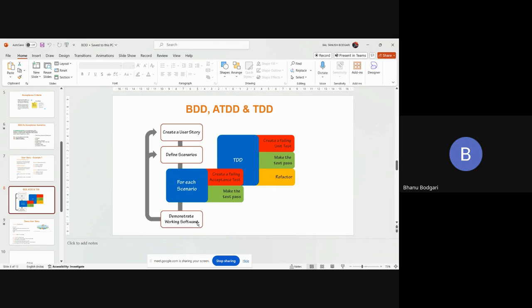And whichever framework you use, particularly I like what we see in the LeSS framework, because LeSS also suggests exactly the same: in all the backlog refinements, make sure your actual customers are also, if possible, on this particular call, because every framework talks about customer centricity. Now, if customers are only used in the early stages or here and there, we will never lead to customer-centric products.